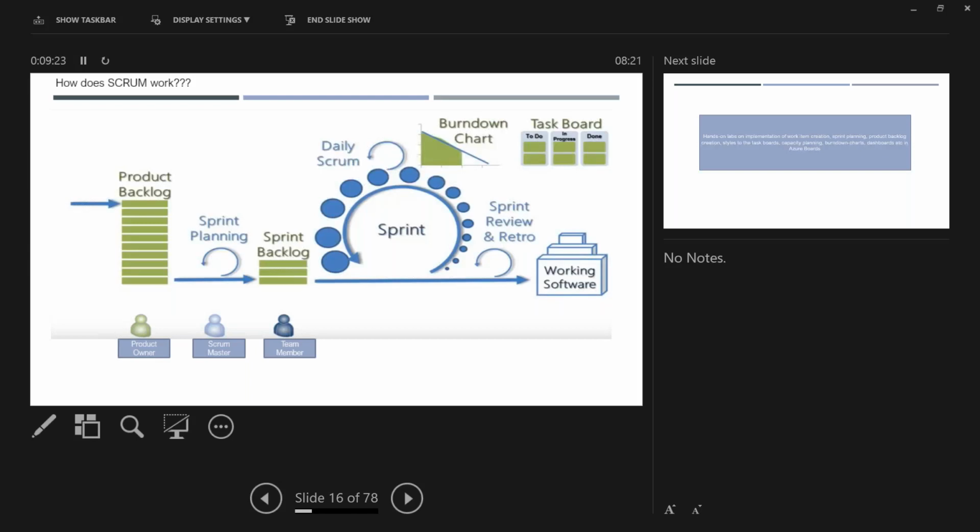You have to take the requirements as per the available capacity, meaning available developers, testers and other people for that sprint, because people will keep coming and going. Let us say I have 4 people available in the current sprint, as developers. Then I can take probably 4 features. Each developer will work on some features.